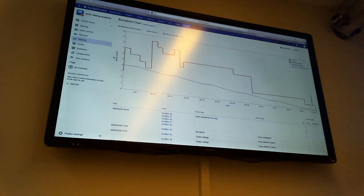Any questions? This is the first time I think I kind of see a burndown chart like this. So what happened in October 10 since you went from 4 to 9? Is there some of these items that you hadn't worked on before or why? I think it was a little bit about the Scrum Master was the one guy quitting. So we had assigned a little bit to other sprints as well. So we started moving a little bit of things over to these sprints so it went up there.